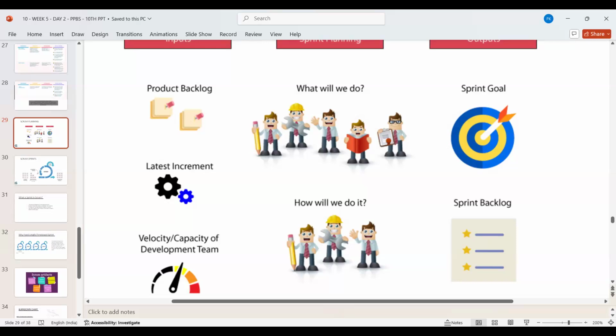Out of those 100 requirements, for this sprint we took 20, depending on the team's capacity, velocity, and availability, and we decided that our sprint goal will be achieving functionality after completing these 20 requirements. How many requirements are pending if I complete 20 out of 100? 80.